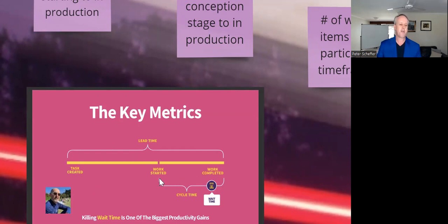Cycle time is a measure from when work is begun, normally by an engineer who has started doing development, through to when the work is in production, same as the end of lead time. These two metrics alone are very powerful in telling you where there are deficiencies in the process of software development. By making them the focus of improvement, which means being able to decrease them, teams will identify areas where they can remove wasteful activities. The end result is that the customer or the end user will get served faster and be happier as a result.